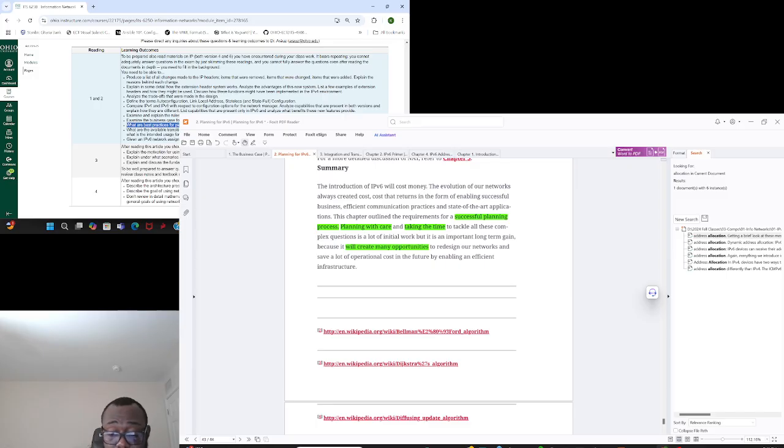Your high level plan should involve what kind of apps you think will require IPv6 as soon as possible. You want to leverage the IP block you have been given. So you have to define your IPv6 requirements based on the network assessments you have done: which nodes must get IPv6 and which nodes must not get it.